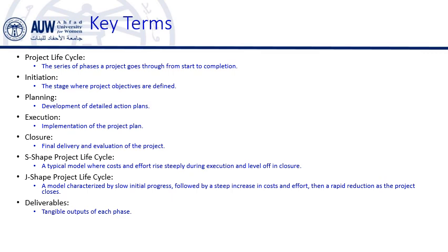This pattern is often used in research and development, R&D, or projects that involve innovation, where the bulk of the investment occurs at the start, then levels off, and finally surges again toward project completion. As in a tech company developing a new product, it may experience high cost in research, followed by a quieter phase while the product is tested, and then a final push during manufacturing and product launch.